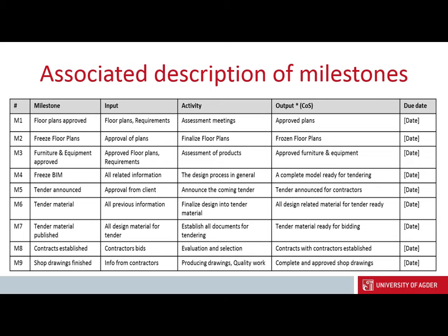And related to this visualization, we need to document the different milestones and describe them: what is the input, what is the activity, what is the output, what is the delivery, and the due date. It's not necessary that you read the content here, but what is important is the principles.